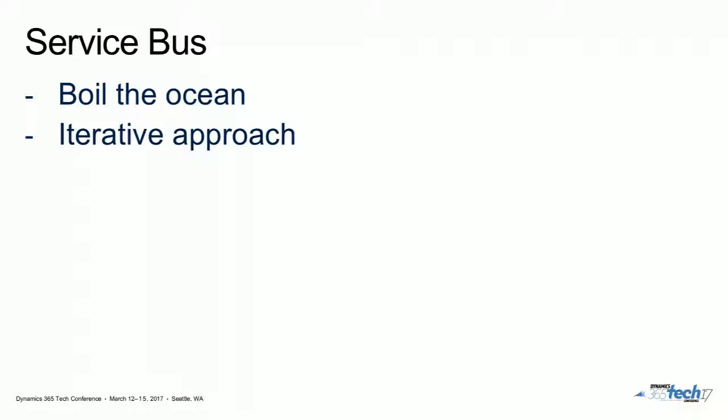Right? Just before you venture out on a project that does both ERP implementation and integration re-architecting at the same time, it's a very hard project to manage if you're trying to do both at the same time. So our recommendation is take an iterative approach. First, just do a lift and shift to get everything to work. And knowing that you might write some integration interface that might get thrown away, which is okay.